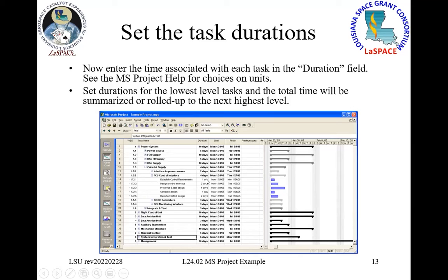Look at this one. We put in all these times like we did before, and that adds up to I think 10 days or 14 days or something like that. But here it says 4 days. Well, that's because right now we haven't set any precedence, right? And so all these tasks are happening in parallel. So it will just capture the length of the longest task in it.